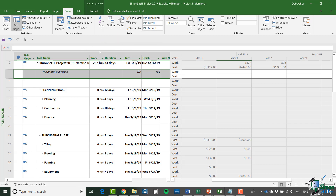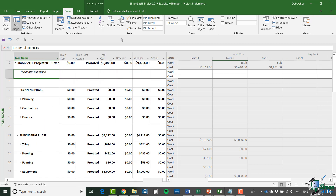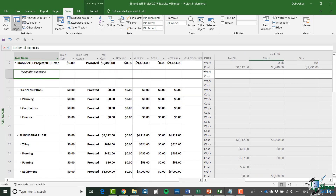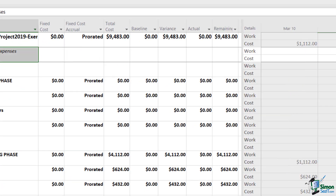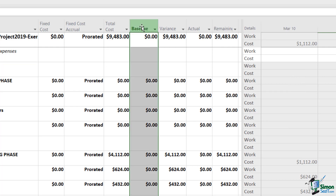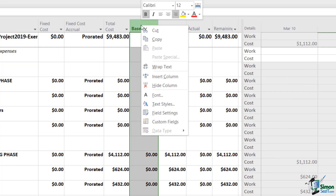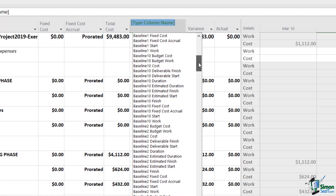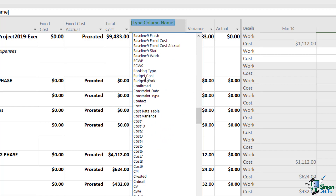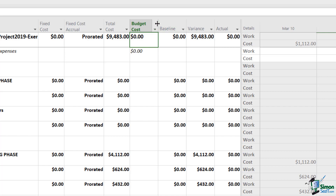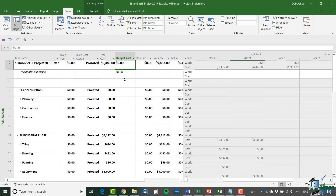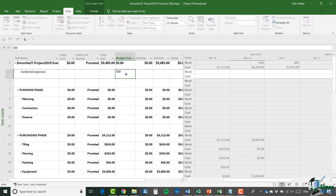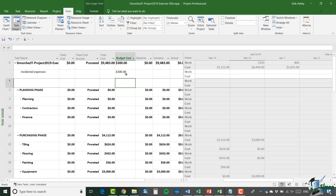I'm going to change to the Cost table from the Tables drop-down and make a bit more room. I'll right-click on the Baseline column and select Insert Column to add a Budget Cost column — these are in alphabetical order, so scroll down to B and select Budget Cost. I now have my new column, and I'll enter $300 for Incidental Expenses. That makes it very easy to keep track of budget costs in the project.